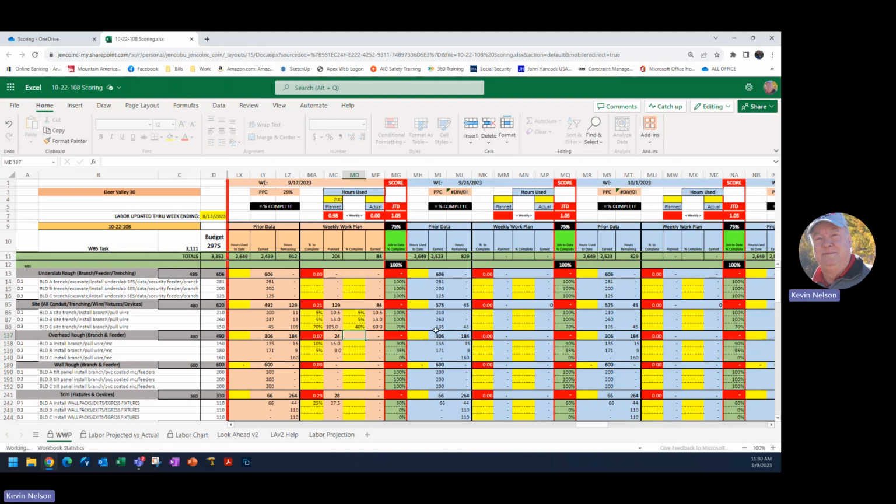So for the sake of argument here, we'll just put in that we didn't quite finish that task. We didn't get 70% complete. We only got 50% complete, and that leaves me 30 hours left on this task. That's fine. We're not looking for par scores of 1. What we're looking for is the reality of where your job is. This is truly an assessment by you to say, where am I at with this project percentage-wise? So you can see we've earned so far 99 hours.